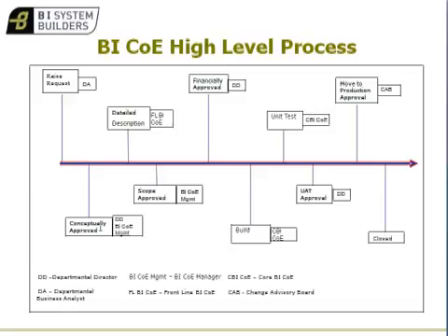We need to know how much it's going to cost, the impact to the business, and what the value is to the business if we do it, and if we have the resources. So a detailed description may be written. If you write the detailed description, you know the scope. The scope can be approved, can be increased, or it can be descaled. Once you know the scope, then you'll know how much it can cost. It can go for a financial approval. Once it's financially approved and money's behind it, go into the build phase.